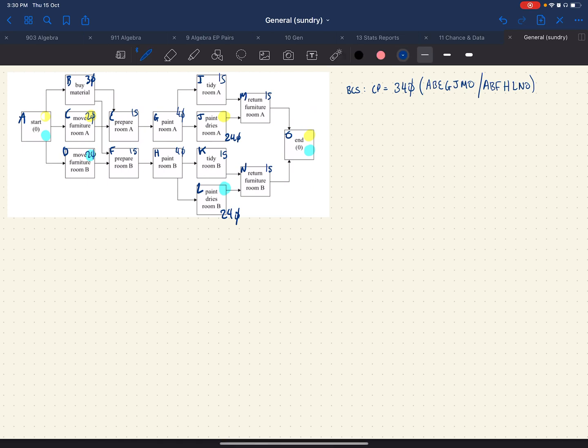So what we're going to have, and I'll put a little bit of a reference at the top, is a six-way piece of information. In the top left-hand column, we have whatever the task denomination is, so A, B, C, etc. Then we're going to have how long it takes, so the time. And then the earliest start time, so ES, earliest start.